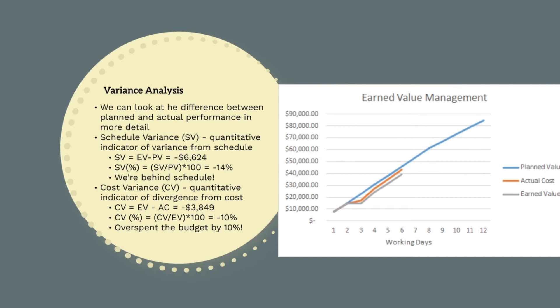Now we've calculated our PV, AC and EV, we can analyse the difference between planned and actual performance in more detail. The two key metrics we'll calculate are schedule variance and cost variance. Schedule variance tells us how we are performing in relation to the schedule baseline, and cost variance tells us how we are performing compared to the cost baseline. Schedule variance, known as SV, is the difference between our earned value and our planned value — so how much work we've actually completed minus how much we said we would complete. For our project, SV is minus $6,624, so we've completed almost $7,000 less work than we said we would. As a percentage, we can divide schedule variance by the planned value and work out we're 14% behind schedule.